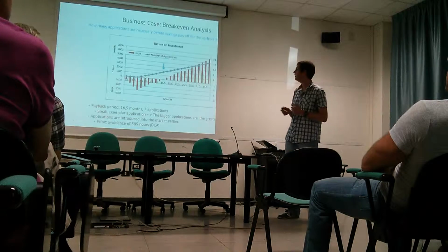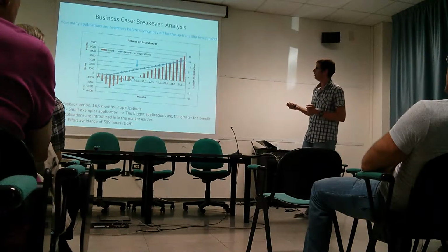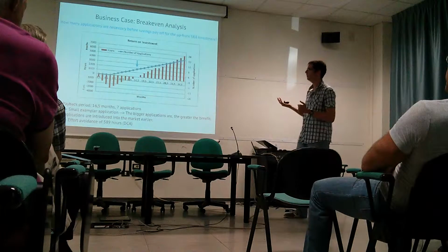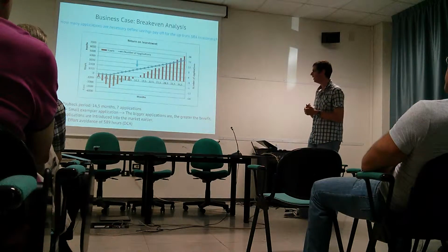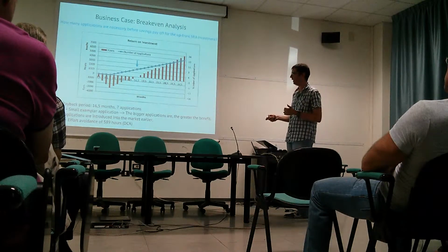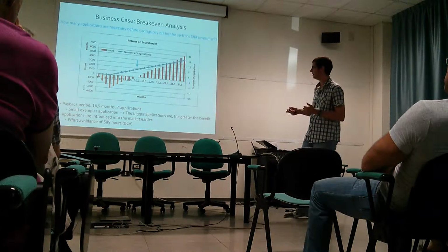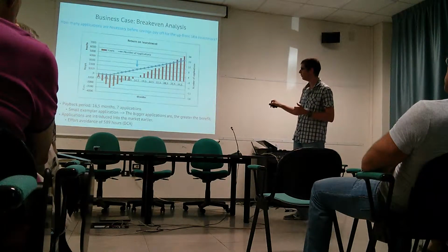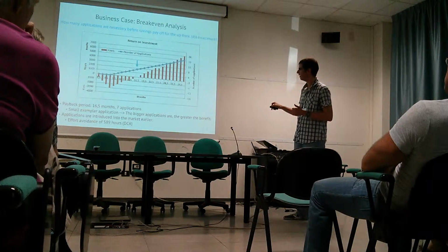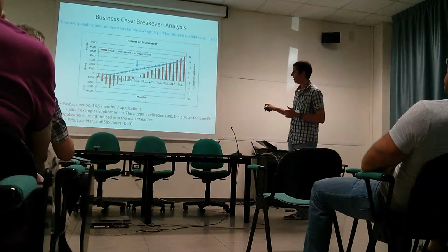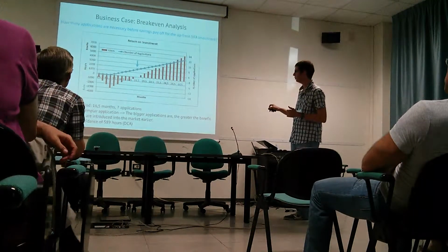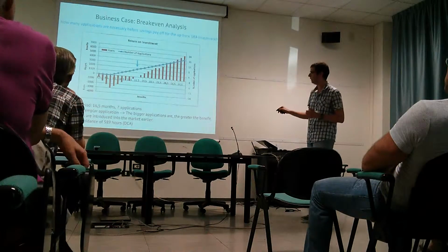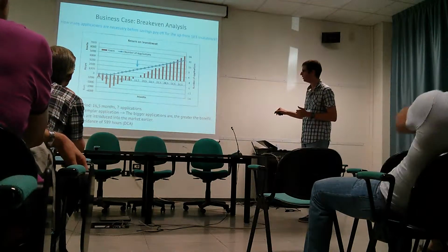And in the second scenario, we wanted to know how many applications are necessary before savings pay off the upfront investment in the software reference architecture. We found a payback period of 16 months, and after 7 applications. Here we see the cash flow. So in the beginning, it was the investment, the first 6 months, and then it started to, with every one of these, the number of applications, 1, 2, 3, 4.